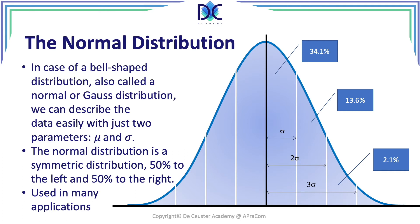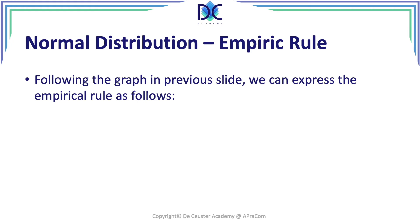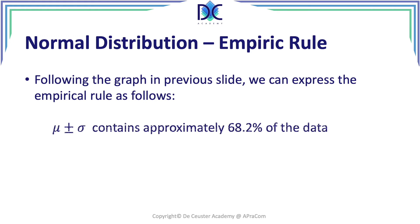That's why the normal distribution is so interesting when calculating certain parameters. When we use the PERT or three-point formula, we find an average and a standard deviation, and with that we can use the normal distribution to calculate the link between duration and probability. Another very interesting element is what we call the empiric rule: mu plus or minus sigma contains approximately 68.2 percent of the data.